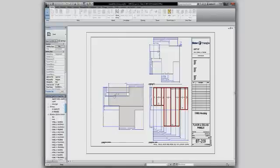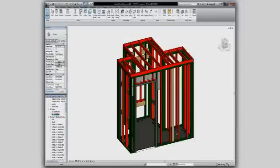Yes, this is really a manufacturing process, not a traditional construction process. It's a total different paradigm. And we really want to stop and take a look at the plans just as early as we can to say, does prefab make sense? There's a lot of coordination that has to be done up front, planning that has to be done on how things are going to tie in, where they're going to tie in, how you're going to get the pods into the building. Virtual design and construction really makes the prefabrication process possible.